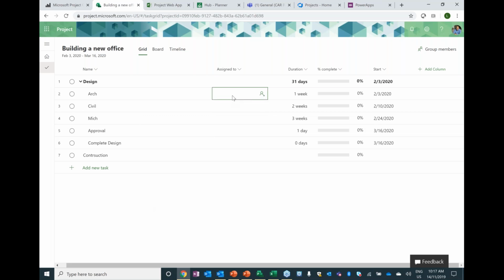Again, people familiar with the other applications for Microsoft Project, you'll know that there's a task or an action that is required in between building a project schedule and assigning resources, and that's build a team if you have an enterprise resource pool. This is gone, and instead of a team, we have what's so-called a group. It's called an Office 365 group. And on the right-hand side of the screen, you can see the group members.